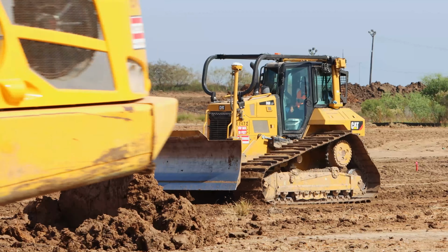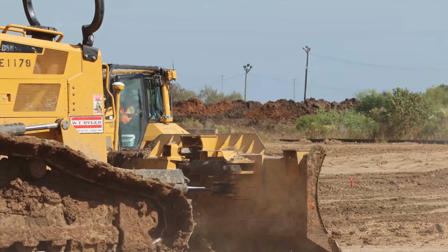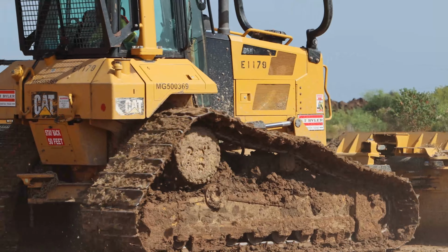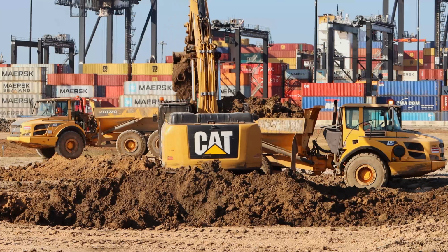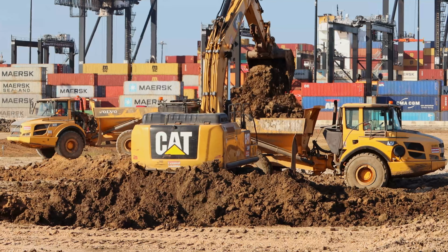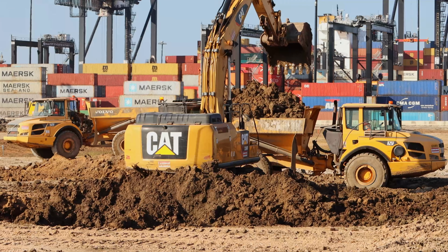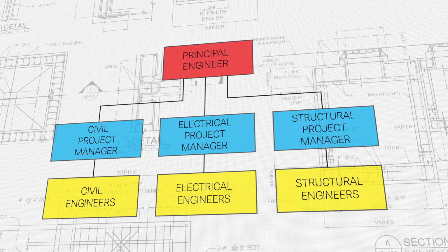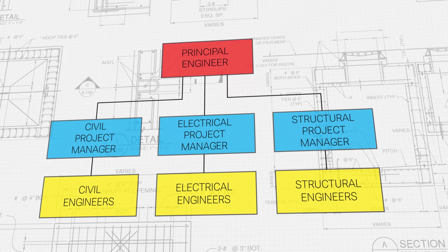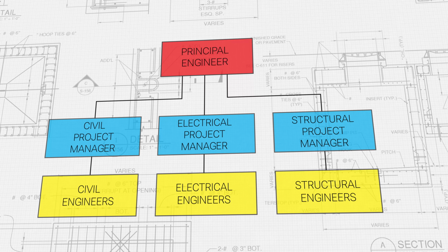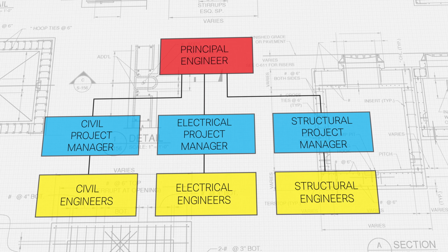Next, engineers do calculations, drawings, modeling, and determine appropriate design for each individual element of construction. This work is split into sections. Sections in the engineering world are called divisions. Each division is developed by its own engineering group that specializes in that field. Each engineering group has its own project manager, who is responsible for overall design of the specific division. The principal engineer oversees all project managers and is in charge of the main decisions.